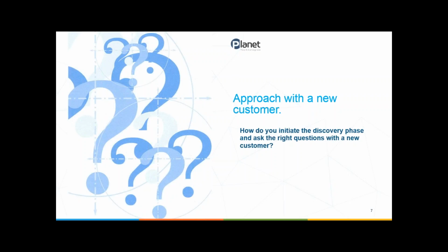Once the production deployment is complete and the customer is satisfied, everything is upgraded as expected, we'll have an actual project closeout. So we'll go through post-mortem, lessons learned, both with the customer, and then we'll do an internal one after we've closed out with the customer. And really, this is key because anything that we've discovered new, there's an undocumented feature, or hey, we ran into this issue with the architecture in this customer's environment that we didn't think about, we add those steps into our discovery process for the next engagement.